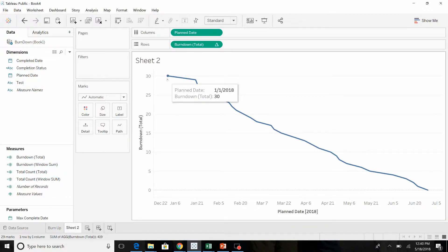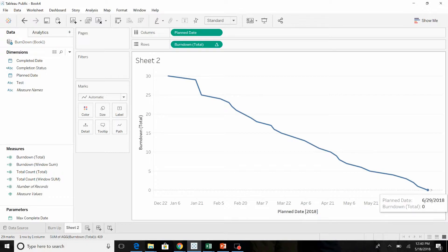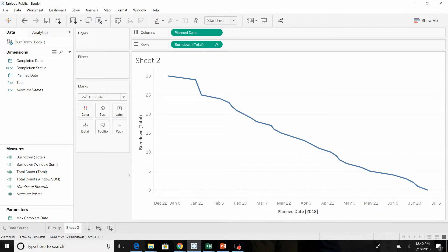Now if you look here, we have 31 tests. The first one is expected to be completed on January 1st, so it's only plotting 30. The last test is on June 29th, so on June 29th we'll have zero tests outstanding.